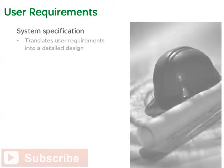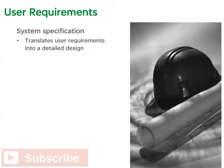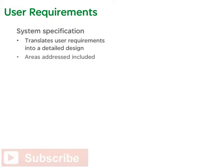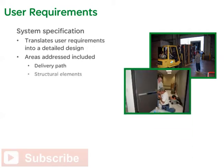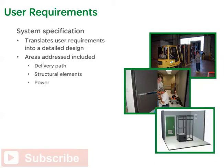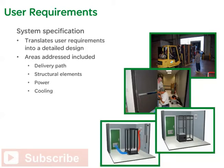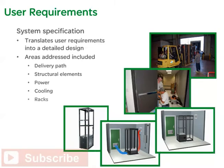To translate the user requirements into a design, the system specification and project manual incorporated a number of additional worksheets to address key elements of the design. Areas addressed included: delivery path — how the equipment gets from the loading dock to the wiring closet floor; structural elements such as existing walls, floors, roof, stairs, and doors; power, which includes distribution, source, and backup; cooling, which includes airflow and surrounding rooms and spaces; and racks, meaning the size, locations, capacities, and weight.